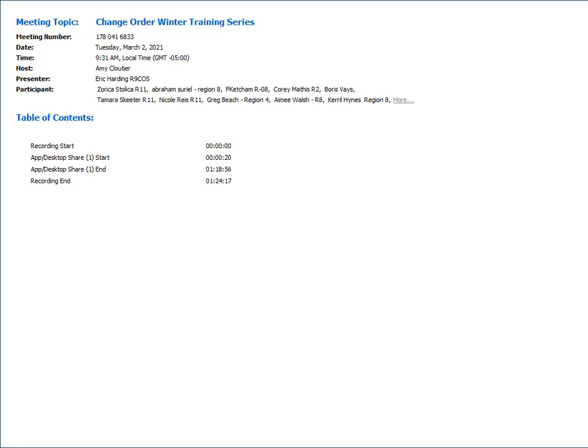So that's probably a regional policy that's been established, and inspectors should be made very aware that they should look for those people because they are a special type of person on site, and they should be recording whether they were there or not for force account work, and then the engineer, area supervisor, RCE will determine how that will be compensated. If there's other contract work going on at the same time as this force account, we should not be solely compensating them for all of their time on the force account work.